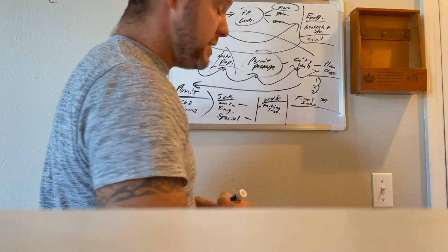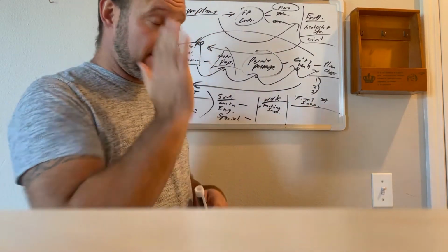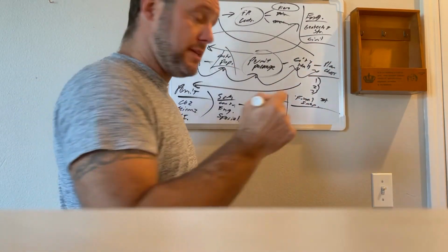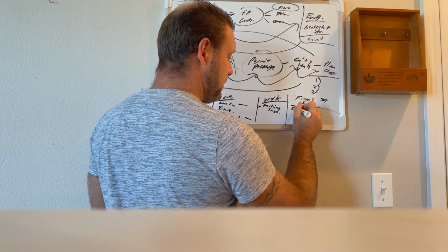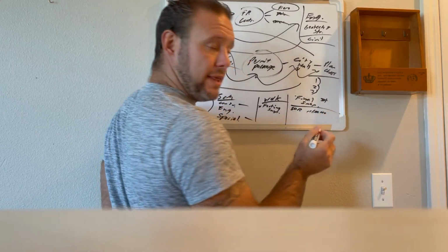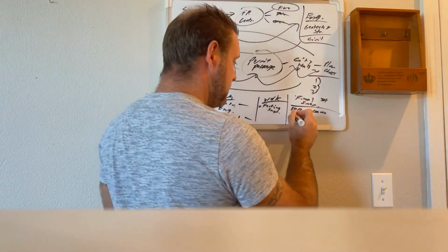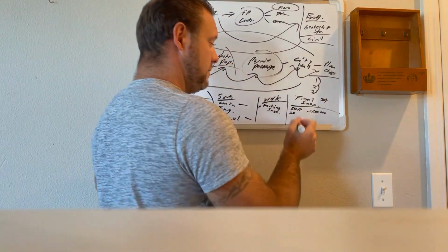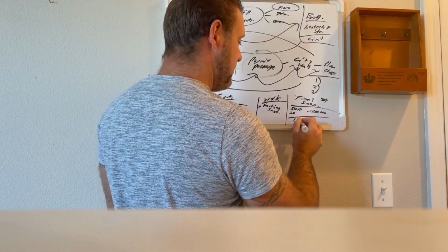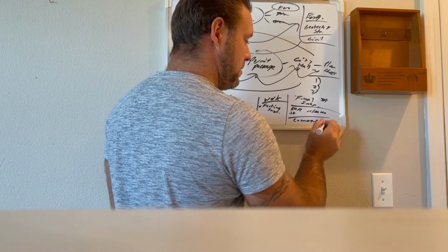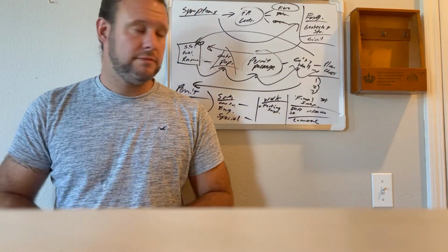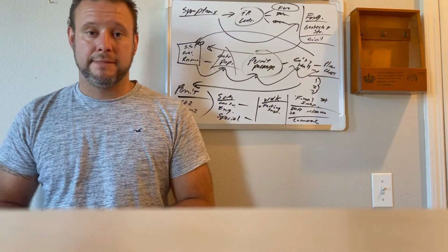After the final inspection, you're not done. The contractor might be done. He does the concrete, cosmetic pour, finishes, whatever. The engineer needs to release his final. The EOR releases final, which, by the way, they don't like doing until they're paid. The special inspector as well. Those two reports will close your permit, and then you have all your cosmetic repairs, which take place something like 15 or 30 days after all of the major work has been done to your footing.